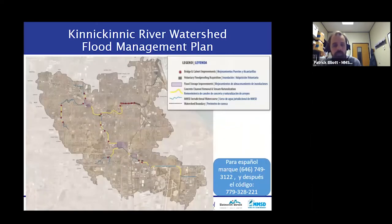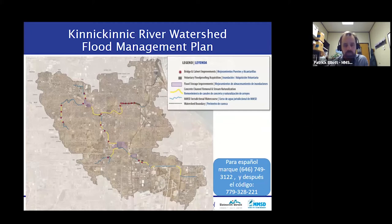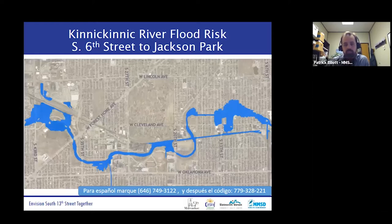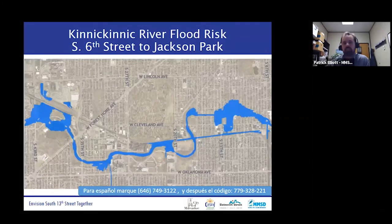We have a watershed-level plan to not only remove all of this concrete and restore the river to a natural design, but also to reduce flood risk. Focusing on the Kinnickinnic River, the project stretches from 6th Street around 6th and Cleveland all the way up into the Jackson Park neighborhood. Over 300 homes are located in the high flood risk zone and a lot of them are located in that area between 6th and 16th.